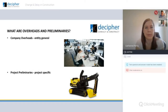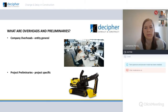So what are overheads and preliminaries? The distinction is to change the name slightly: instead of calling it overheads, refer to company overheads and project preliminaries. That gives you a very clear distinction. Company overheads are generally office overheads and administration, while project preliminaries would be the running of the site and the plant involved in that.